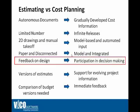In 2D estimating, work is typically performed after the completion of a design phase — after conceptual or schematic design is completed. But when the estimating work is done, the project design team has already moved on and is working on new design decisions, so that feedback tends to come too late. With the 5D cost planning method, cost planners become part of the decision-making process because you can provide cost feedback on any design decision immediately.